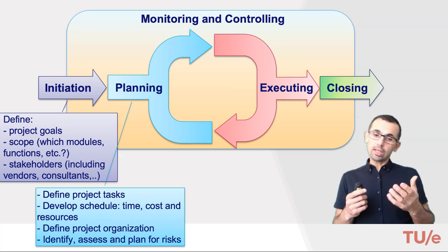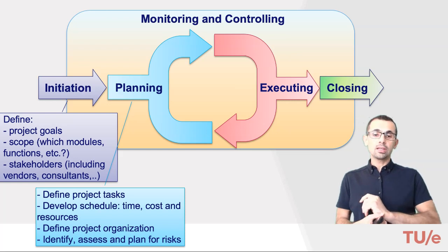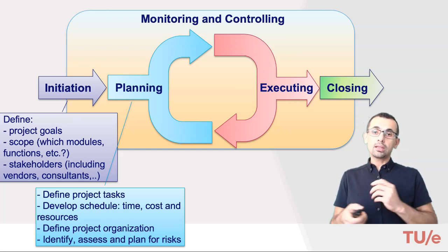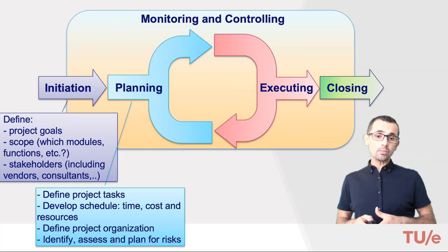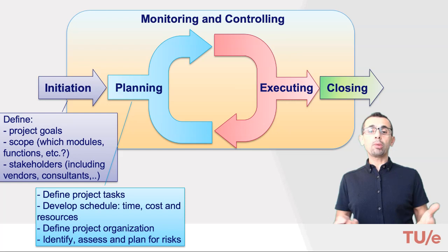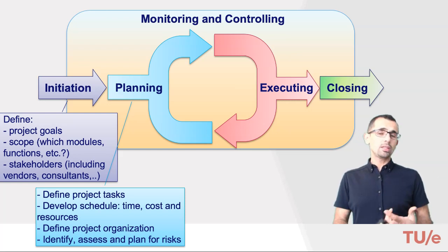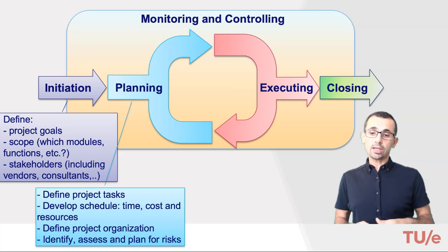Again, it's very important, and it's very intense, I should say, with a lot of activities that we need to do. At this stage, we dig into the details of the scope itself. We refine the scope to a level where the project tasks and work packages can be determined. This is followed by the project schedule with the task sequences, the time and resource requirements, cost, and so on and so forth for each project task.